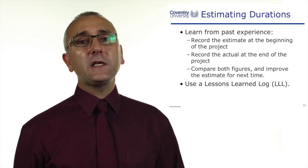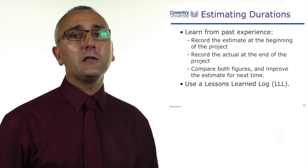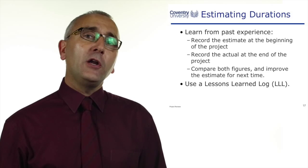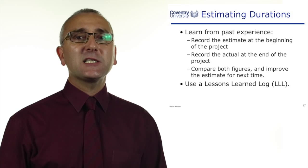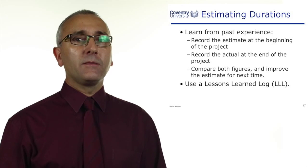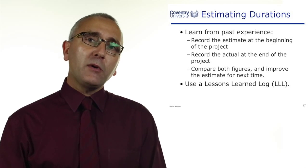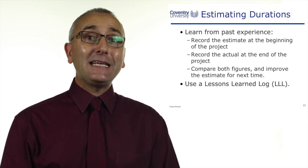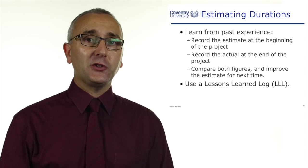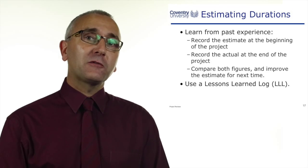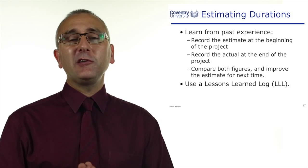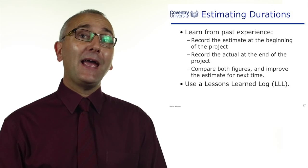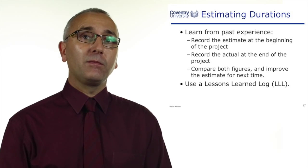One of the things we're going to learn in this project review is learning from our past experience. Remember, we recorded the estimate at the beginning of the project, and as we went through the project, we record the actual and we can compare the actual with the baseline.